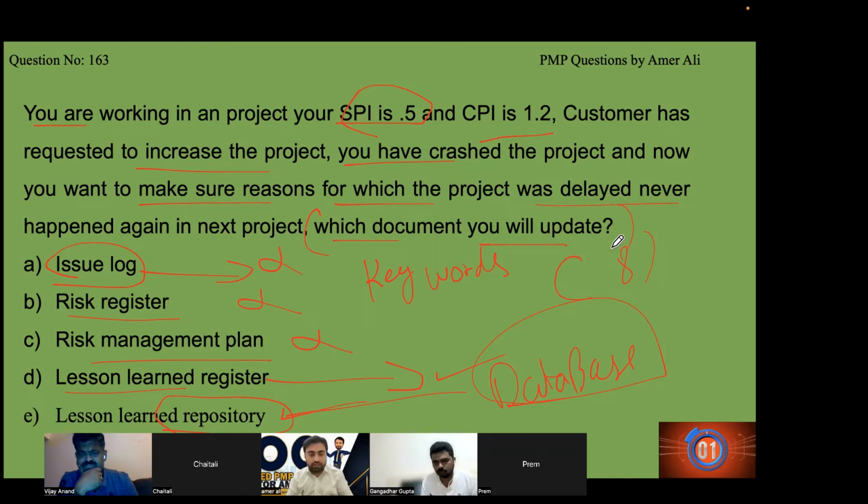Vijay, please. Sorry for interrupting your question. Yeah, my question is, I'm putting in the change request. During the change request, I'm going to update the plan. I'm going to update the lesson learned also in the change request. No. Lesson learned, you don't update that way. First of all, you don't need a change request for any documents. First thing. And you don't need a change request to update the lesson learned register. Once the problem is solved, then we update the issue log. And from the issue log, we get the lesson: this thing should never happen again.